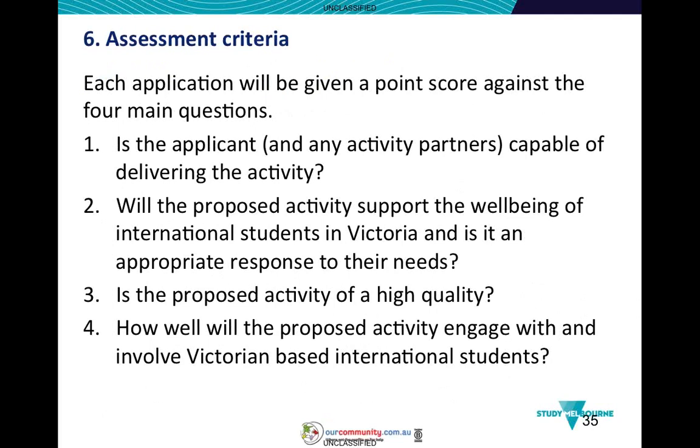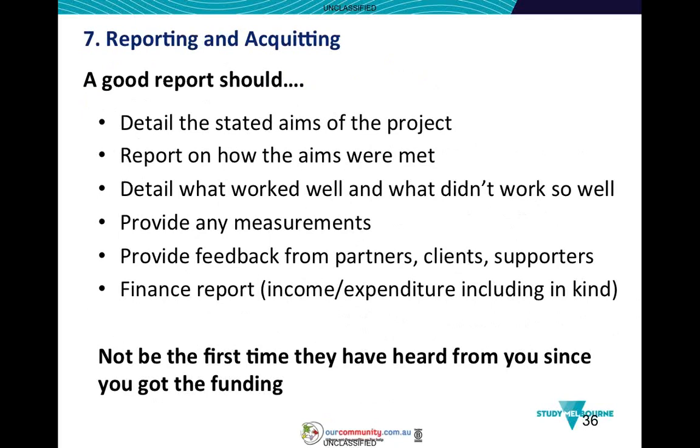And reporting an acquittal. With your report, you will obviously receive some information if you're successful about what that looks like. But what you will need to do is refer back to your activity plan and talk about how you've actually achieved what you set out to do. Talk about what worked well, what didn't work well, what you did as a result. That's really important as well, to share the learnings that you've achieved as a result. Provide the measurements that you stated you would provide. Any feedback or testimonials, please also share those in your report.